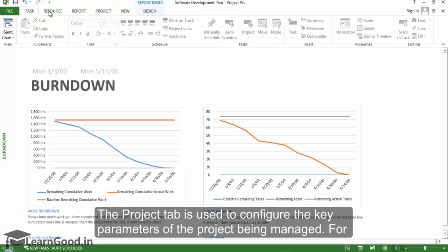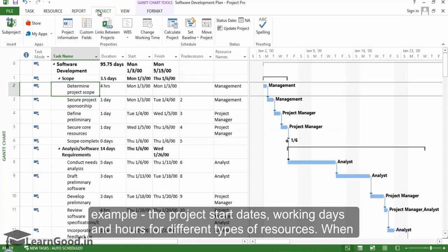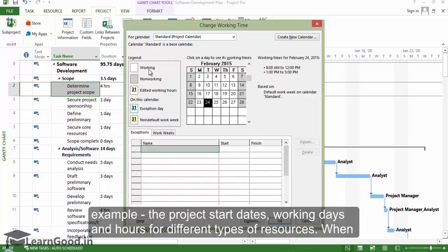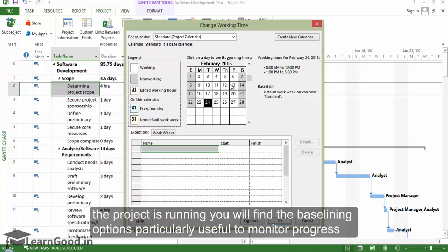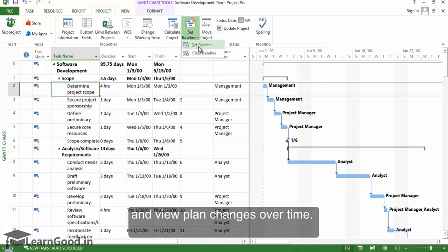The Project tab is used to configure the key parameters of the project being managed — for example, the project start dates, working days, and hours for different types of resources. When the project is running, you will find the baselining options particularly useful to monitor progress and view plan changes over time.